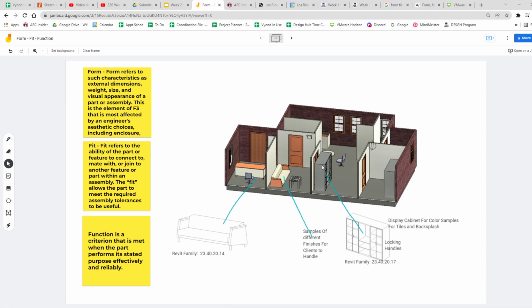And of course, since the product that I was working on, which was the wet side piping, was the smallest, easiest to change, it was all my stuff that had to change. And of course, we were happy to do it. First of all, we got paid more money for it. And second of all, it solved a serious problem. And when you're doing design build, there's no way to understand the full complexity of something like that. You just understand that those things are going to happen, and you do coordination meetings to catch them as soon as you can. And we were able to do that.